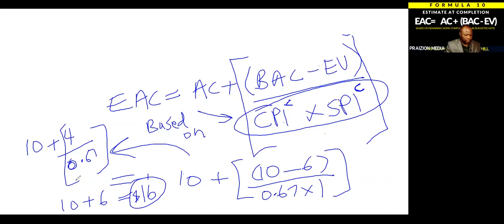So let me just show you these conditions really quick, one by one. All right, so taking a look at EAC, condition one, which is your formula that says EAC equals AC plus ETC. This is based on a brand new bottom up ETC. So if they tell you something to the effect of the budget is fundamentally flawed, then you know they're talking about this formula. Okay, so EAC1 is when the budget is fundamentally flawed. It is not reusable. You cannot reuse the budget. It's totally messed up.